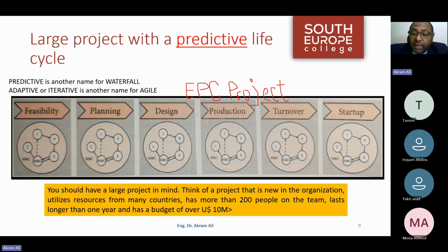But what if it's missed in planning, but I understand that I have to do progressive elaboration. So when I come to inspect such an activity, 2 months before it, I hold a meeting. I get all the people who are responsible for executing such a task, and I ask them, what do you need? And they will tell me, I need X, Y, Z. Do we have X, Y, Z, or what is missing? Then I start to follow up and chase what's missing to make sure it is available on site on the set date. So this is how I practice as a project manager,